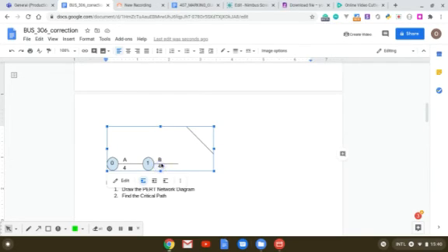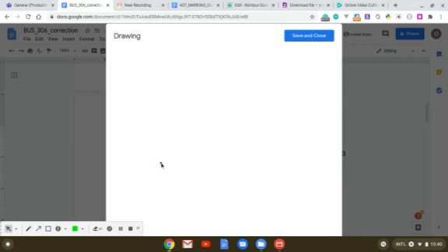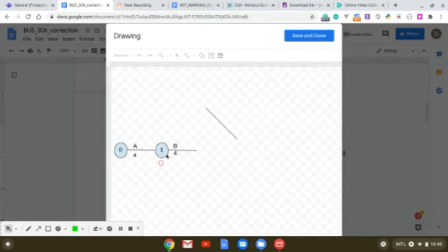I go back, double click. This is A. This is where A ends. This is the activity. This is where it ends. So B starts from there. C will start from A and has a time of 2, so let's copy this line and repaste.